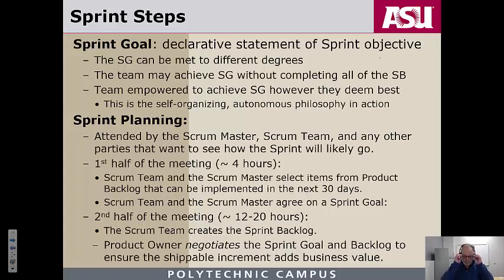All right. Now, it's possible that the team achieves a Scrum goal without completing all of the things on the Scrum board. In particular, you can say, yes, we achieved. We have a potentially shippable increment that meets the sprint goal, even though we didn't complete everything. When we look at our Scrum board or sprint backlog, we don't have all the tasks done. We may not even have all the requirements done, but the user interface wireframes are done. So we had achieved our sprint goal.